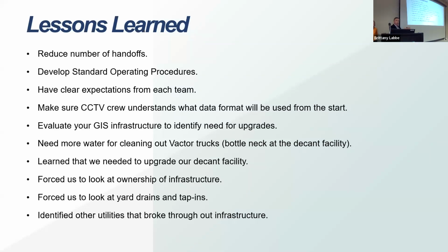SOPs written for each one of those processes, so that if you have staff changing over or anything else that happens, the next person that comes on can just pick up the project and move forward instead of having to figure out what the predecessor did. So that was very important. And we've actually done that with all our processes in the Stormwater department now. So everything we've done, I had the staff do SOPs for everything they do, so it's easier to hand off work to the next person.